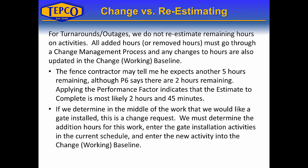If I come to the contractor mid-work and say I need a gate installed on the fence, that is a change request. We must determine the additional hours, enter a gate installation activity into the current schedule with the added hours, and enter that new activity into the change or working baseline as well, so that we can earn against that activity.